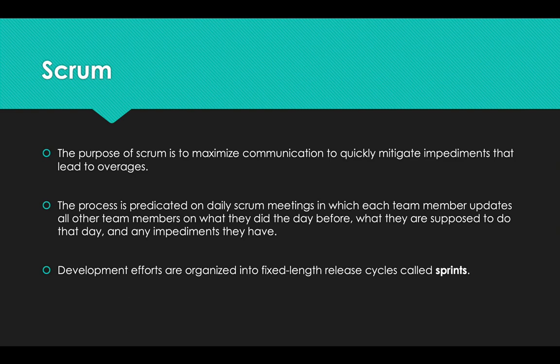It's really supposed to be maybe 3, maybe 4 minutes per person, and the Scrum Master should take all of the impediments away and facilitate across Scrum groups to make sure that all of these impediments are dealt with in an efficient kind of way.